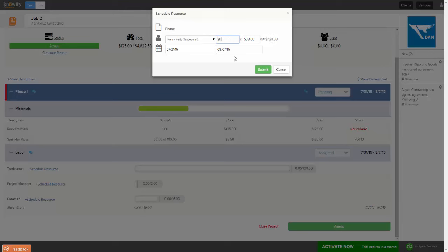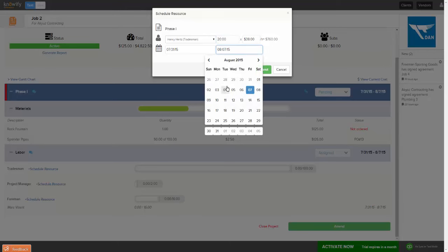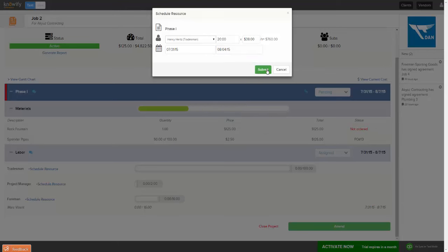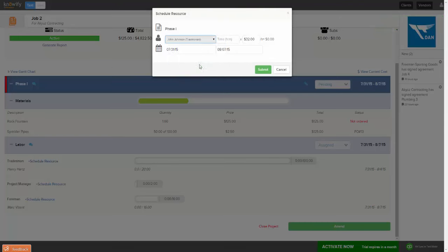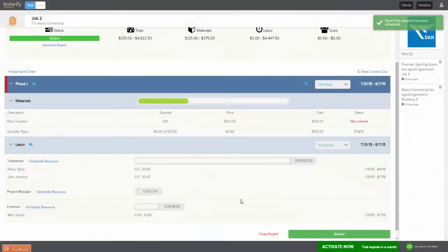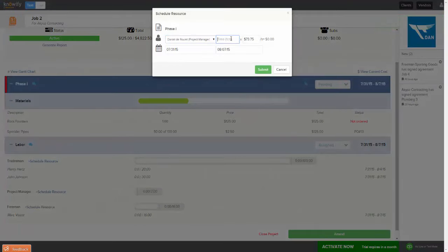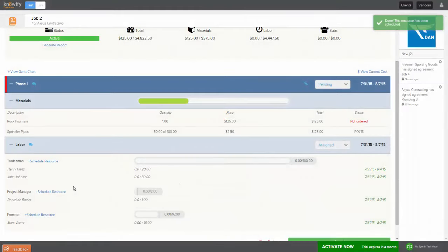I'll say I'm going to need him for 20 hours. I don't really know who I'm going to need for the latter half of next week, so I'll schedule him for 20 hours through next Tuesday and submit this. And you can see that this is going to drop him in here 7/31 to 8/4. I can schedule another tradesman. So John Johnson, I'm going to need him for maybe a little bit more, 30 hours, and he'll go the whole length. So I can do a lot of scheduling now within this interface. Obviously, the same is going to apply for my project manager. So I really have total control over the schedule now straight from the project plan at the resource level, which is going to be very helpful.